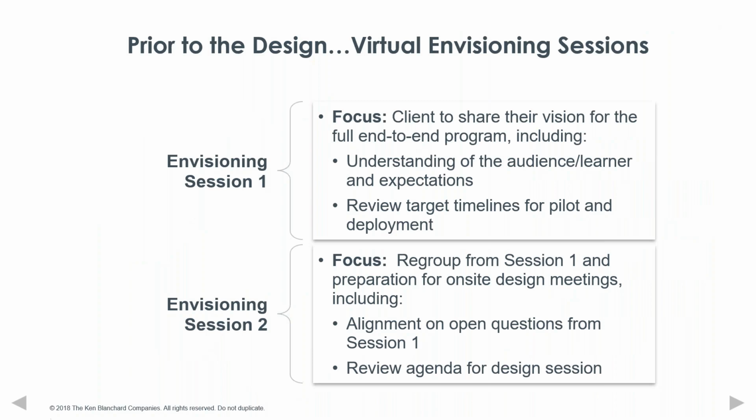So typically prior to the design, we do these virtual envisioning sessions, and really it's for the client to share their vision for the full end-to-end program. It helps us to get a feel for how well they know their audience and learners, and what they're expecting us to be able to deliver. We're looking at that timeline for a pilot for deployment. We do a second envisioning session before we're all in the room, and it allows us to get alignment on open questions, things that we haven't seen that we should see before we're all together.